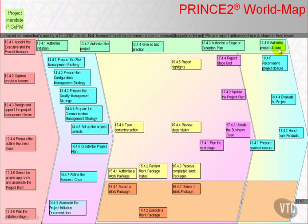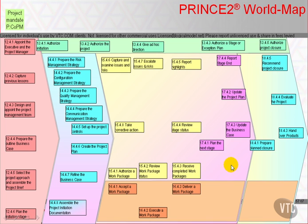Then the project board authorises that project closure. If we have issues, we capture and examine the issues, and where appropriate escalate issues and risks to the project board in order that they can give ad hoc direction. Finally, capturing an issue or risk may result in the need to produce an exception plan, or other causes may lead to preparing premature closure.